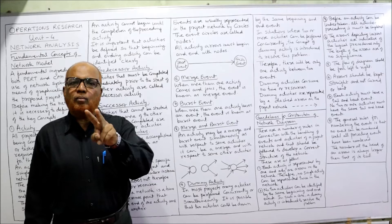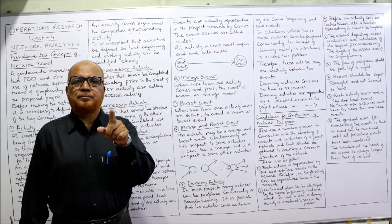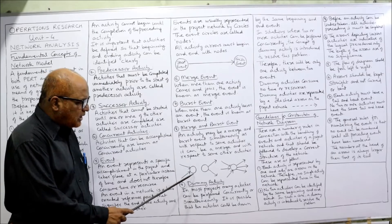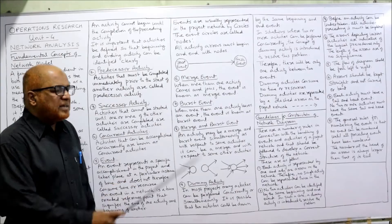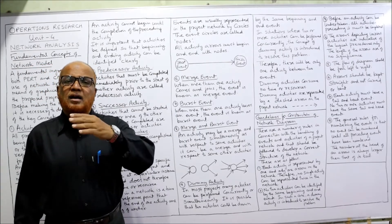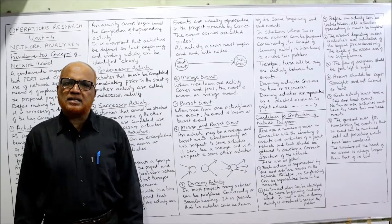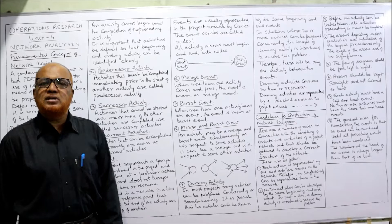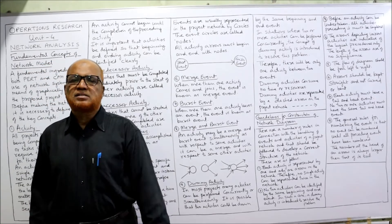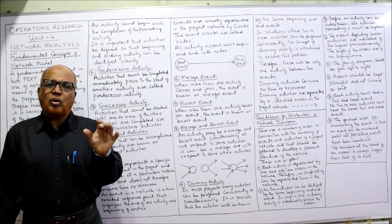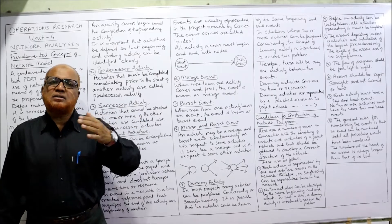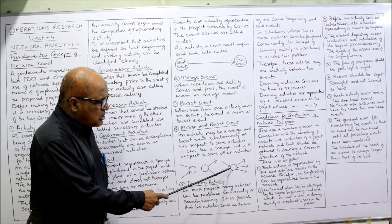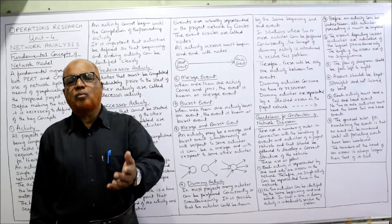A merge event is when two or more activities come and join an event. You can see here — two activities are merging into this event; this is called a merge activity. A burst activity is when two or more activities come out from an event — the event bursts into multiple activities. A merge and burst event is when two or more activities are merging simultaneously and two or more activities are also bursting from the same event.